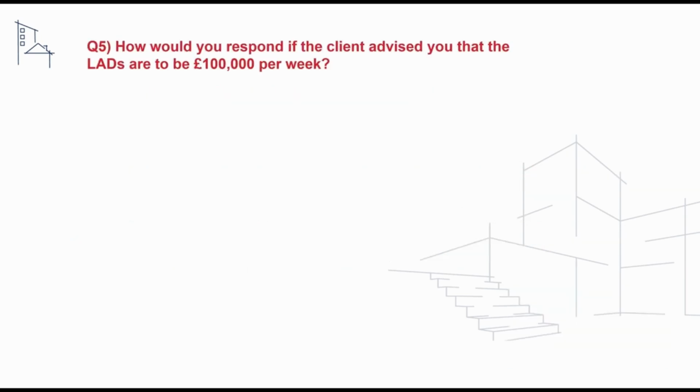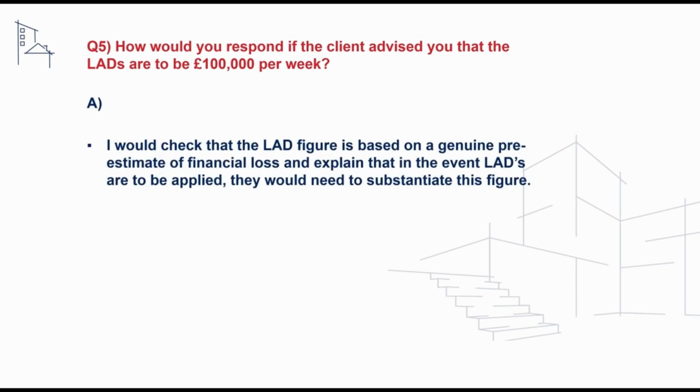The next question we'll take a look at is how would you respond if the client advised that the LADs were to be £100,000 per week. And in this scenario, candidates could advise that we would check the LAD figure is based on a genuine pre-estimate of financial loss and explain that in the event LADs are to be applied, they would need to be substantiated.